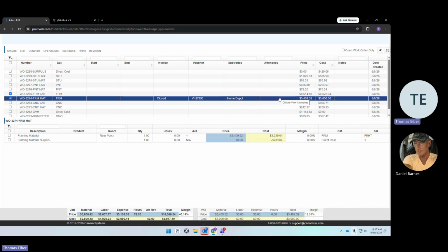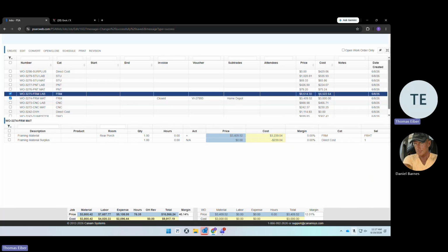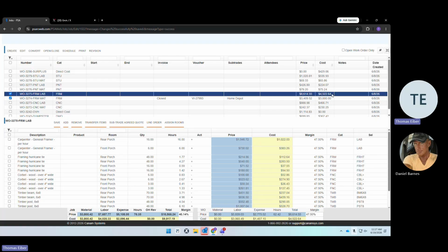And if the sub does not necessarily need that total, right? If they're going to do this job for $7,000 total, you make sure that you pay yourself back. You want to make sure that you would include a deficit, possibly on this one, pulling out the additional $522.64 in this example, and then putting that additional money in the surplus so that when you close these two, you're only closing them for the amount that you need to spend. We don't want to lose this money because then you're taking away your power as a PM.